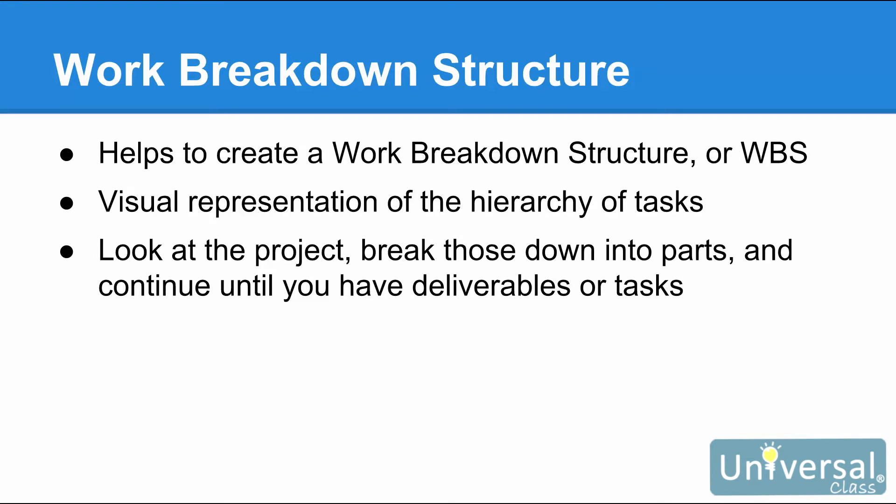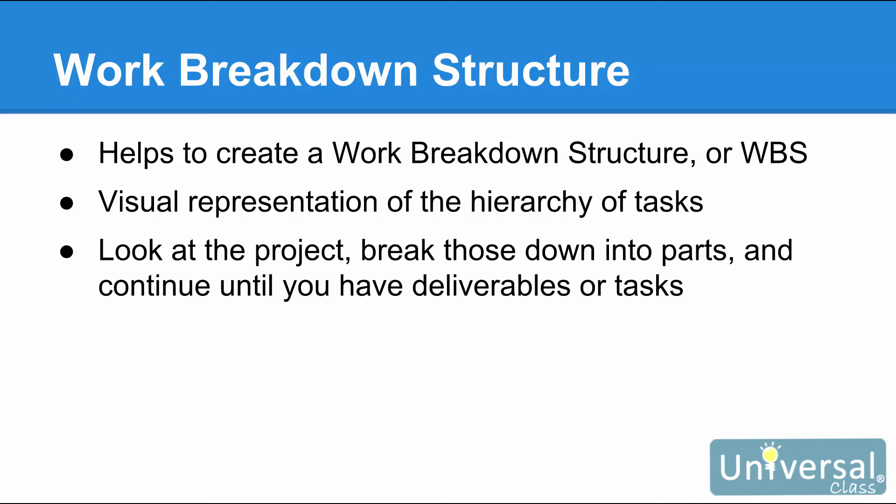To plan your tasks, it helps to create a Work Breakdown Structure or WBS. This will be a visual representation of the hierarchy of the tasks associated with your project. You create a WBS by looking at the project as a whole, breaking it down into large parts, breaking those large parts into smaller parts, and then breaking down those smaller parts until you have exact deliverables or tasks. In other words, what do you have to do to accomplish a large part of the project? What do you have to accomplish in order to accomplish these things? And so on. You can use an organizational chart or an outline to create a WBS.